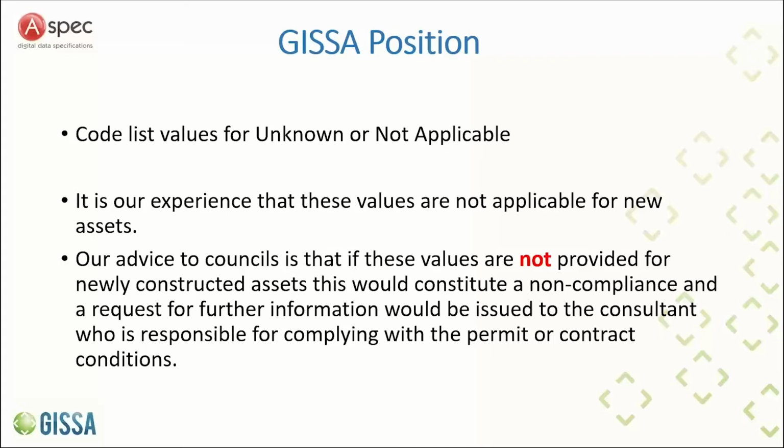Don't provide data about a wall material if you haven't seen the wall be erected. Don't provide data about a roof structure if you haven't seen the roof be erected. Go to the authoritative source, whether it's the contractor or the supervising engineer or architect on the job, and get that information from them.